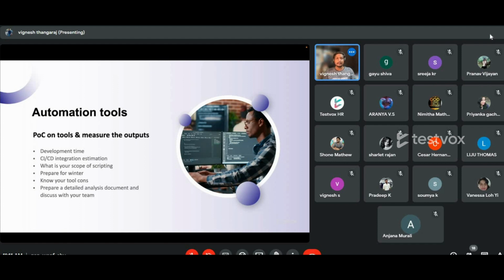Now you try to automate things and come up with an estimation of time. Usually when people are writing test cases, they have a scope defined: this is a low level, this is a medium level, this is a complex level. Then you can come up with a strategy: if this is a complex test case for this tool, it will take this much time. Now you have 1,000 test cases to be automated, and you have metrics to measure. Let's say a complex scenario takes 2 days to automate. Medium cases take 1 day.